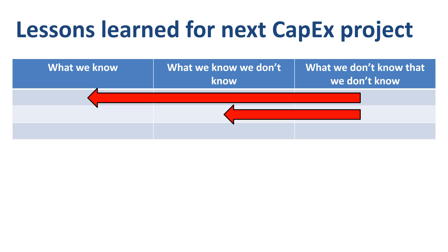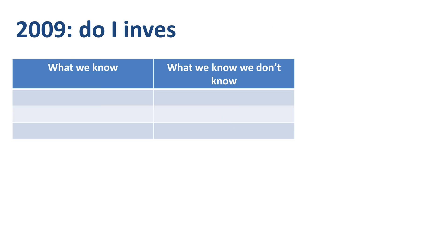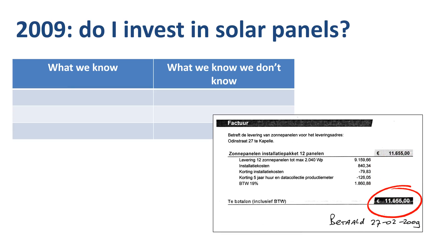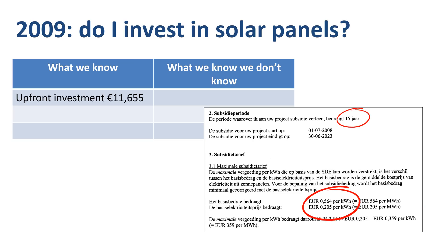Let me illustrate this with an example. Back in 2009, I asked myself: do I invest in solar panels? At the time this was fairly new technology, and the upfront investment for 12 solar panels including installation was €11,655. The government provided a 15-year subsidy paid in installments over the lifespan of the project, guaranteeing revenue at 56 cents per kWh generated, up to a maximum of just over 1,700 kWh per year.